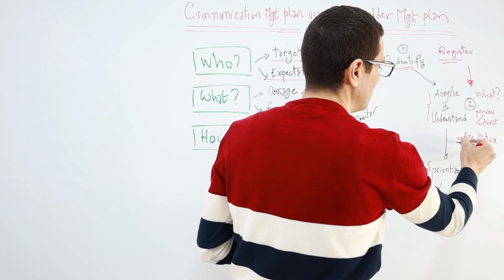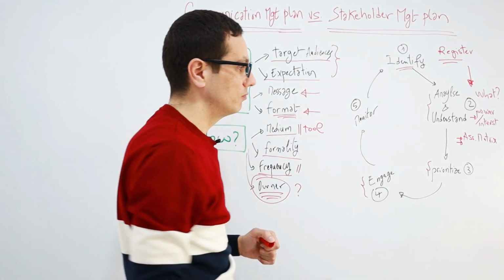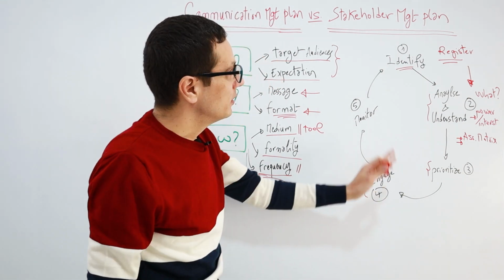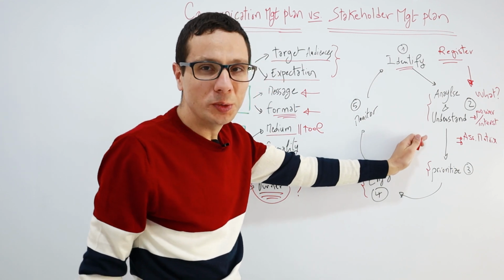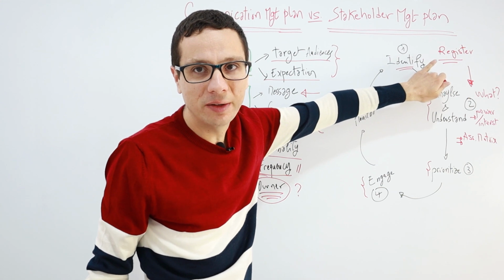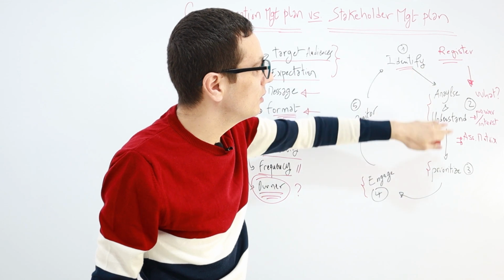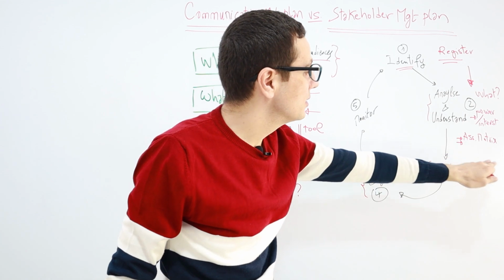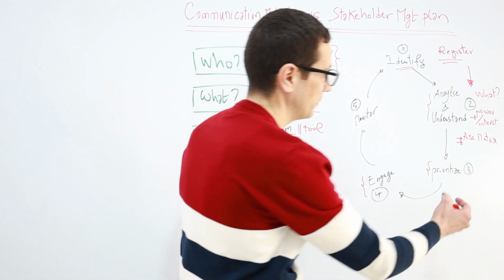We might use other tools for analyzing and understanding stakeholders. The stakeholder management plan defines what tools we will use according to which type of stakeholder we have. For example, if we have a key stakeholder, we should right away use the engagement assessment matrix and prioritize using the power and trust grid.